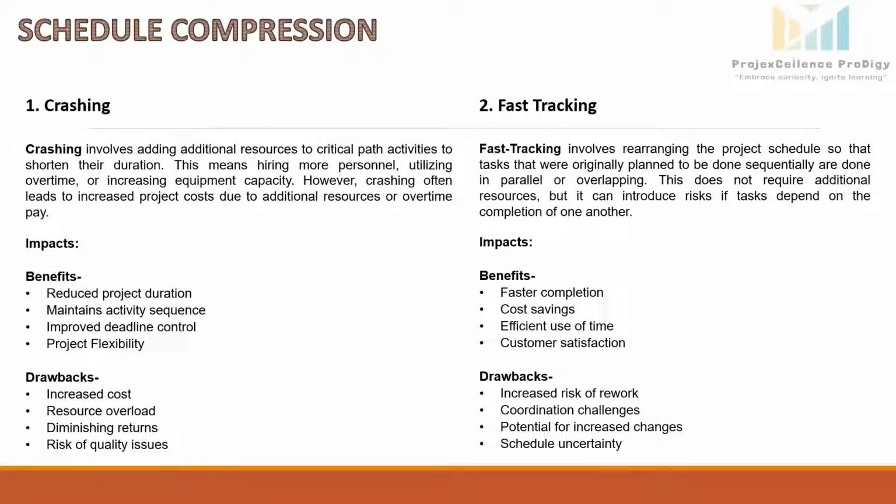If we talk about benefits, first is reduced project duration. By adding more resources, labor, and equipment, critical tasks are completed faster, shortening the overall timeline. Maintains activity sequence. Crashing keeps the original activity sequence intact. It minimizes disruptions to task flow and planning.